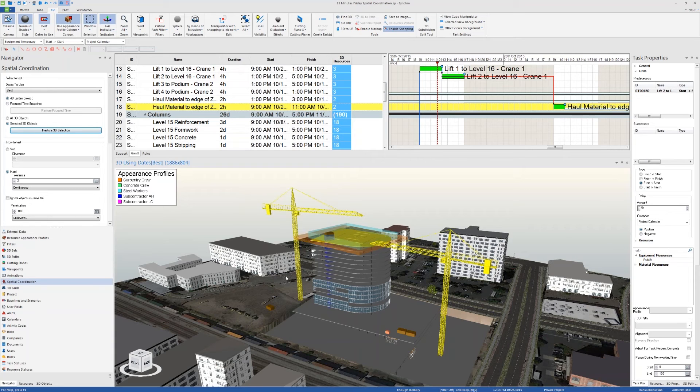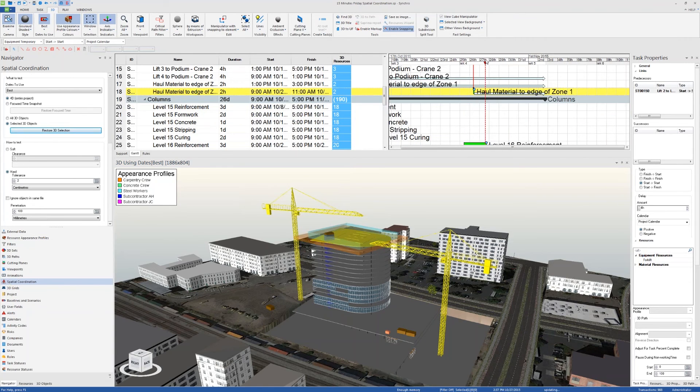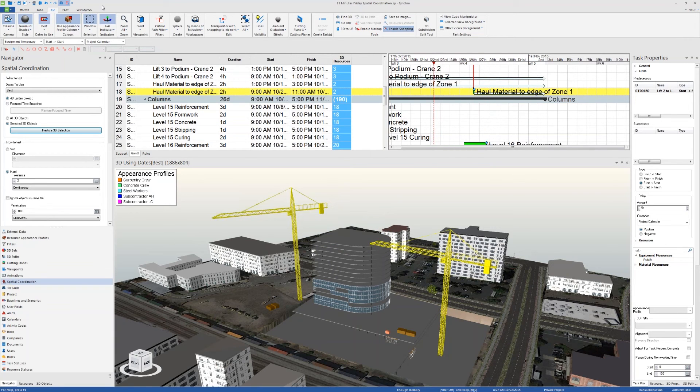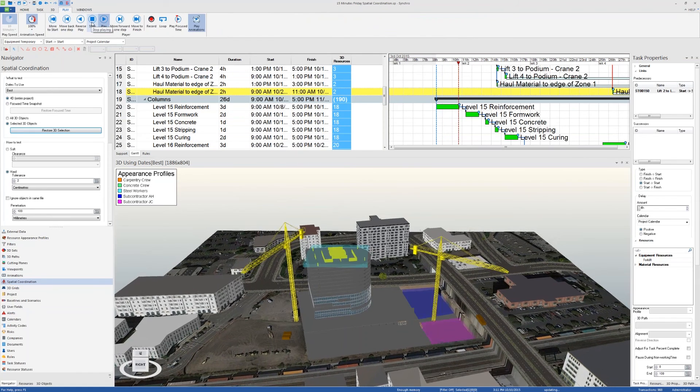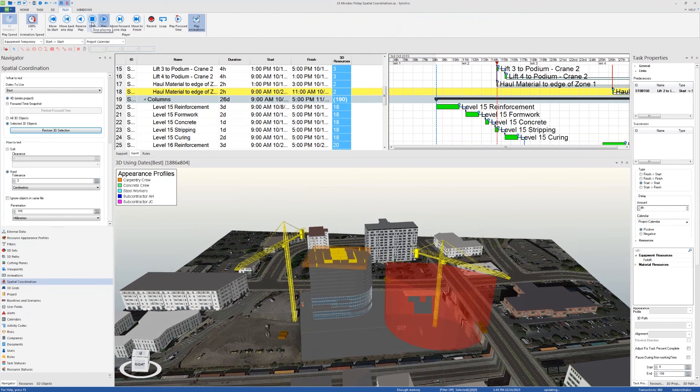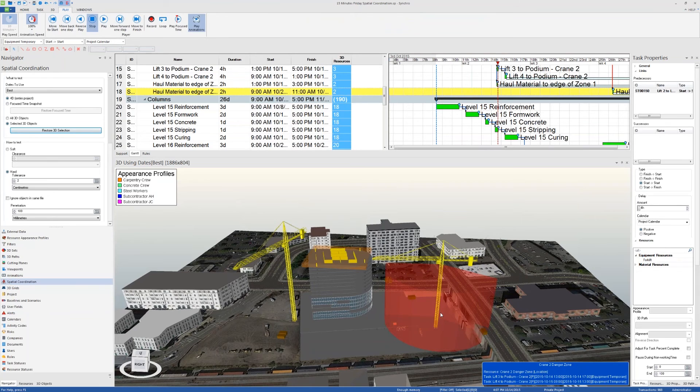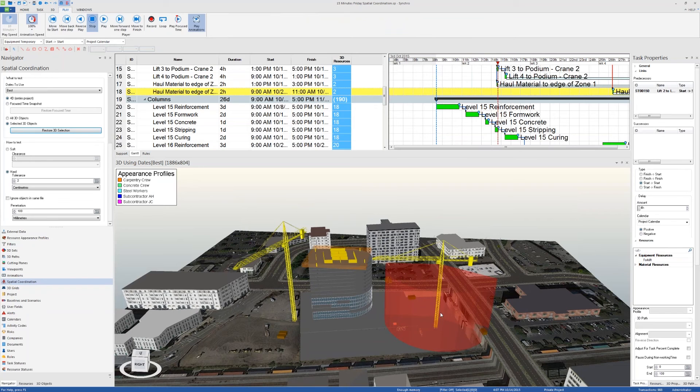Okay, so depending on how you do your schedules, there are many ways to do this, but I suggest running clash detection at each phase. Preliminary clash detection can be run at the earlier phases of the project to notice clashes between cranes and high level clashes. Here I modeled a workspace to show the whole area, so it's not very accurate. You can use that for preliminary clash detection, but where clash detection is most useful is at the look-ahead phase. In each look-ahead plan, when things become clearer, when we know more how trades are going to flow, we can run spatial coordination to coordinate that. If you want to go more in detail, like power plant component replacement operations, you can run clash detections at the micro level to see if a forklift can fit between two equipment if some movements are clashing on 3D paths.